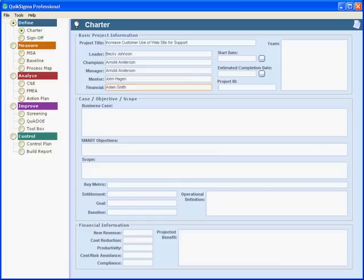We recommend that each project be reviewed by somebody from the finance organization, both when it's chartered and just before it's reported out. That gives you independent validation of the numbers being presented to management.